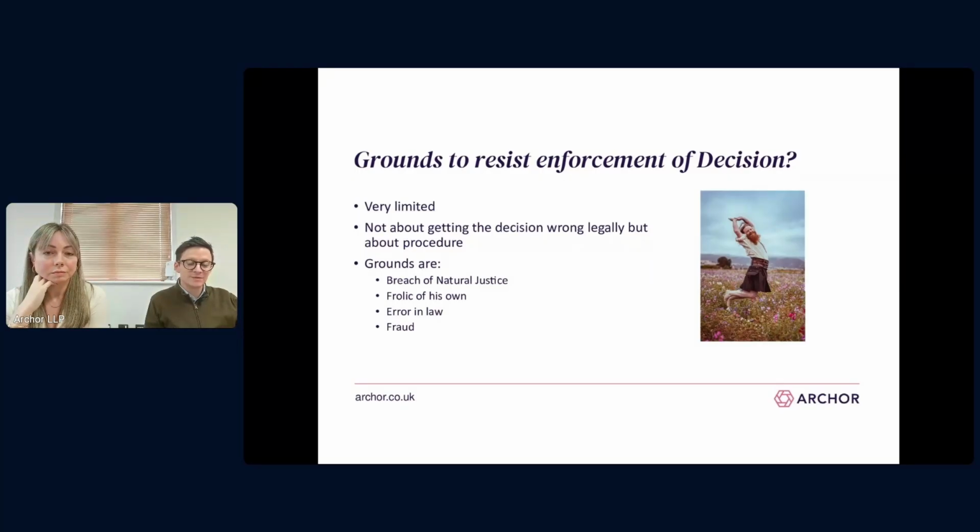And the claimant, which will be the insolvent company, needs to give security: one, for the adjudication sum, two, for the costs of enforcement, and three, for the costs of the proceedings to decide the dispute later on. And that is often hundreds of thousands of pounds, and for the most part is a bar to those companies enforcing. So again, be alive to any claimant in enforcement proceedings being insolvent and what you can do about it.